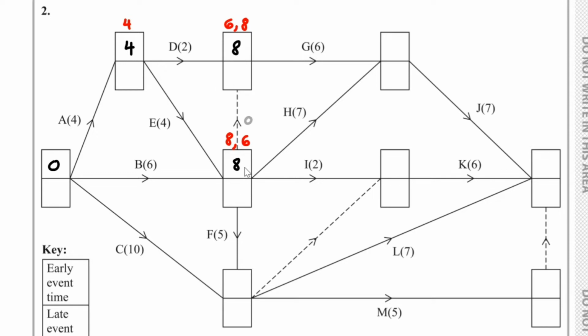And then we have 8 plus the 5, which is 13. We also have the 0 plus the 10, which is 10. We choose the larger one. The 13 goes here.